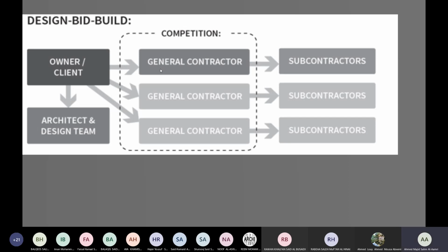Okay, now once again, there was a mistake. The contractor has told me that there is an issue. How does the contractor have any power over the consultant? Can he order the consultant to change anything? Is there any contract between the contractor and the consultant? On what basis will you talk to me as a contractor? If I'm a consultant and you are a contractor, on what basis are you going to talk to me? I don't have any agreement with you.